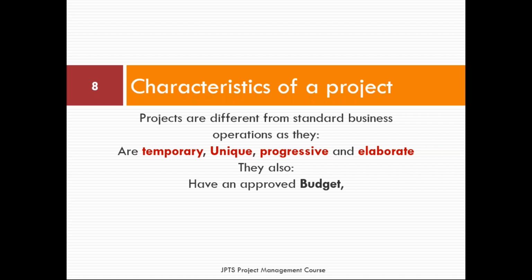Now, there's usually a meeting between the project manager and the project sponsor during the project planning phase. That particular period is when the sponsor and the project manager agree on how much it will take the project manager to execute the project, having considered everything that the project needs. As soon as that fixed amount is agreed, that's it. It's expected of you as a project manager to deliver that project at that approved budget. So every project has an approved budget.